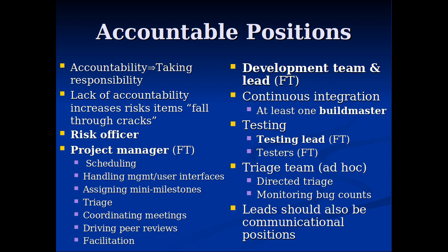A risk officer is important. This is not a full-time position. And in a team your size, I say this with caution, with fewer people to coordinate than a 10-person or 12-person team like we commonly deal with in this class, you might think about the project manager taking responsibility for risk management as well. That's a possibility, because often the project manager's responsibilities grow at least linearly with the number of people in the team. You have to find common meeting times that work with everyone. You need to email people, keep people in sync, etc. And it's going to be a smaller project, with fewer people involved. So the risk officer duties might be folded into the project manager for a team of your size. For a larger team, I'd never recommend that.